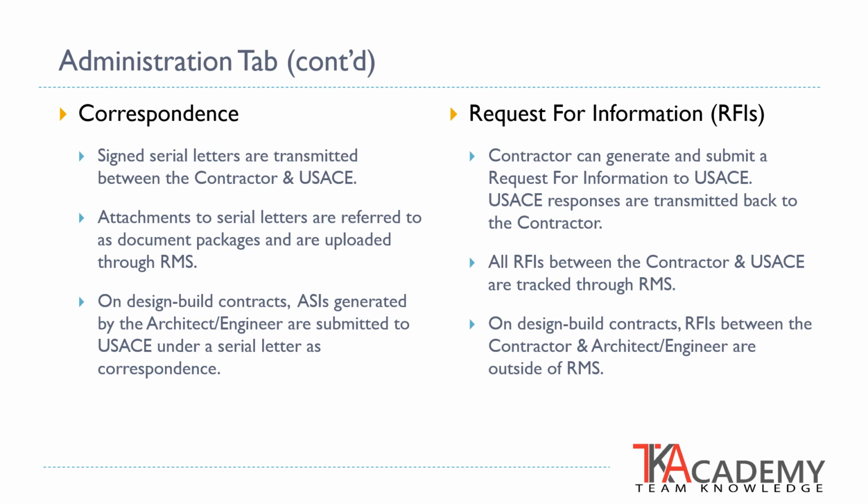There is also a feature for Request for Information, or RFIs. A construction contractor can generate and submit a request for information to the U.S. Army Corps of Engineers. The U.S. Army Corps of Engineers responses are transmitted back to the construction contractor through the RMS. All RFIs between the construction contractor and the U.S. Army Corps of Engineers are tracked in the RMS system. On a design-build project, RFIs between the contractor and the architect engineer are outside of RMS.